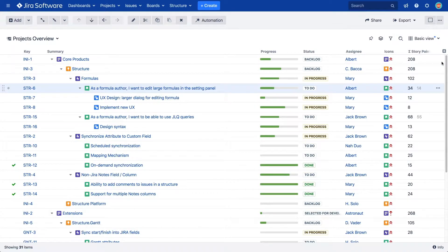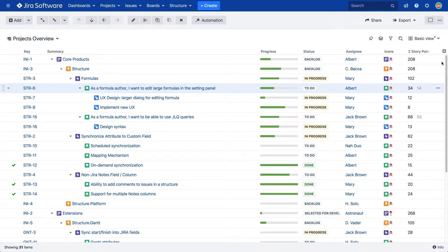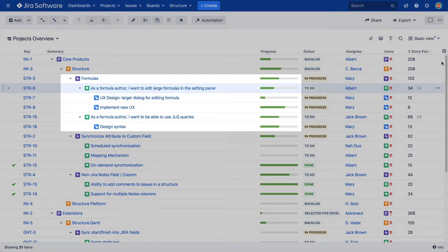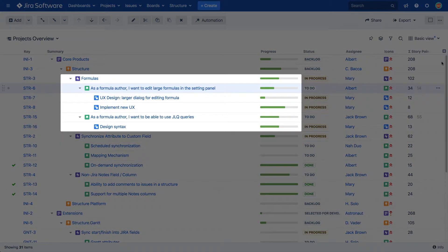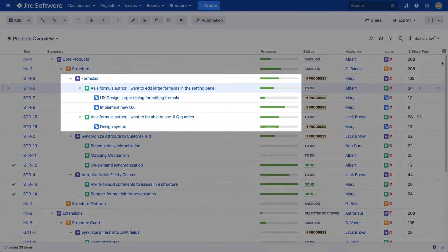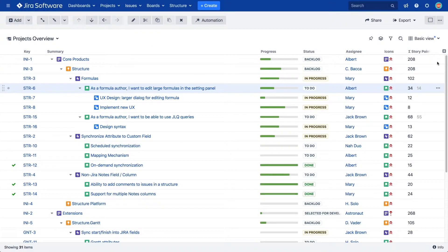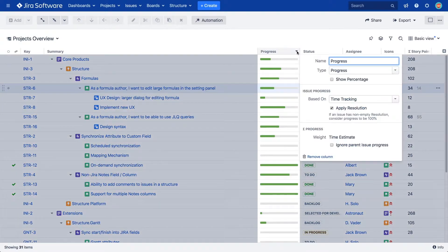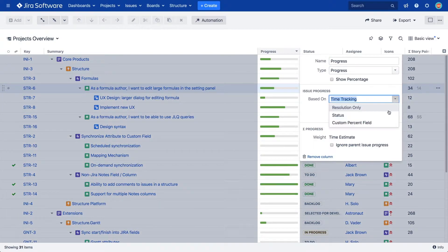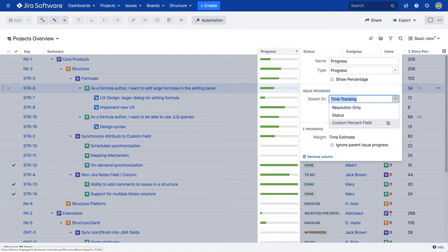Now, let's take a look at progress columns. These are helpful when managing large projects by visualizing progress calculated across your entire hierarchy. For example, the progress of an epic is based on the overall progress of all stories and the other issues beneath it. Progress columns can be based on time tracking, status, or a number of other parameters, such as issue weight, depending on what your team uses for estimation and tracking.